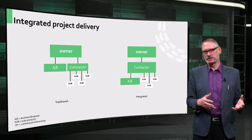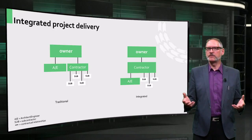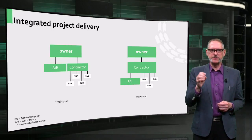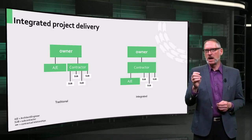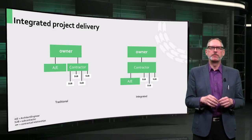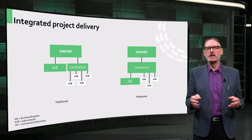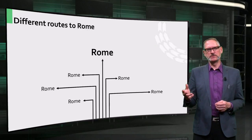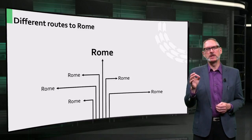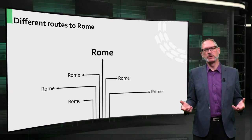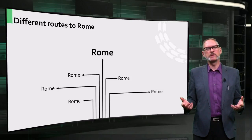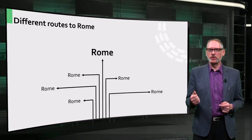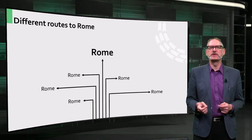For larger, often public sector projects, you might opt for an integrated delivery process in which a consortium of different actors bid to provide you with the design, construction, operation, and maintenance of the building in one package, providing single-point responsibility and better protection against cost overruns. Independently of which form of procurement one chooses, the next step is to make a plan for the project. We will lead you through this process in a series of assignments, each of which will build on the last, to provide you with both an overall view of the project and a plan for its realization.